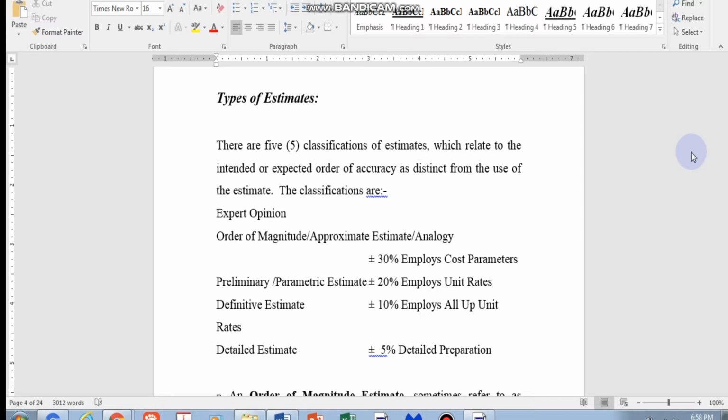Then you have a total for the particular project. You have about 1000 meter cube, so you take 1000 meter cube and multiply by 550, 600, 650, or 700, whatever your all-up rate is. Then you do that for every component of the work. For example, the pipeline rate is going to be inclusive of laying the pipe, the workmen and the machinery, the excavator, everything.